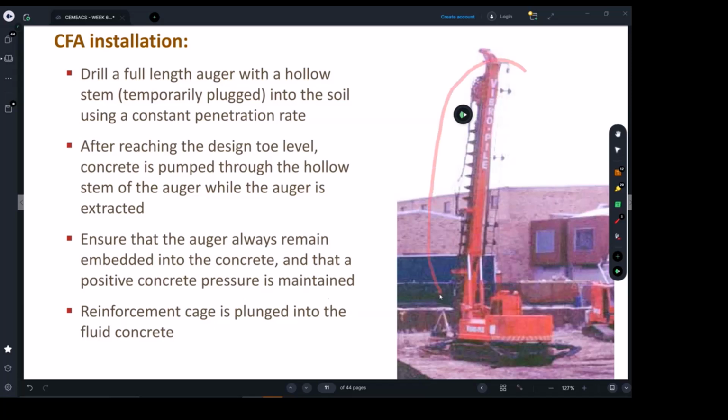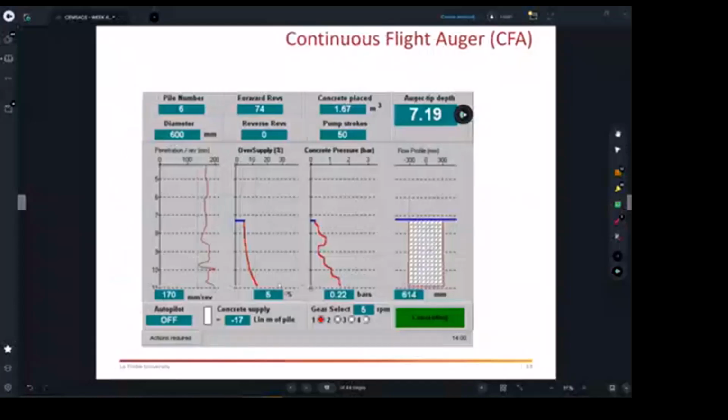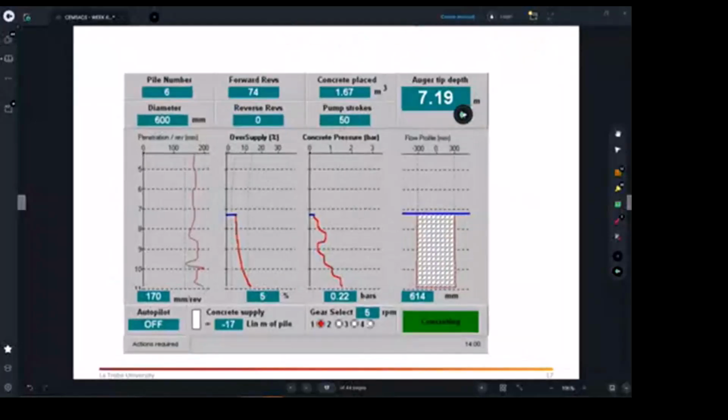Talking about this process, one of the key things is you need to ask for reports that will ensure the pile is actually built cohesively. What does that mean? There are some documents. Let me show it to you now. For example, this is what you need to see. I will talk about this later on. This is going to give you all the information the construction engineer needs to verify that my 100 piles, or my 80 or 20 or whatever number of piles, are correct.